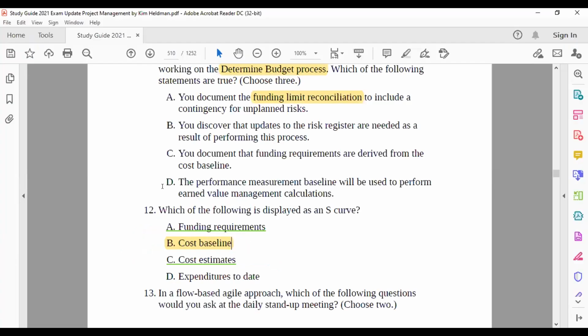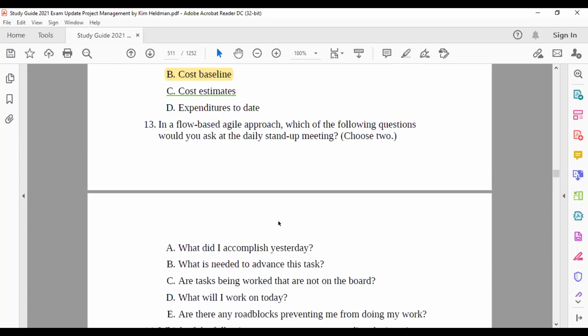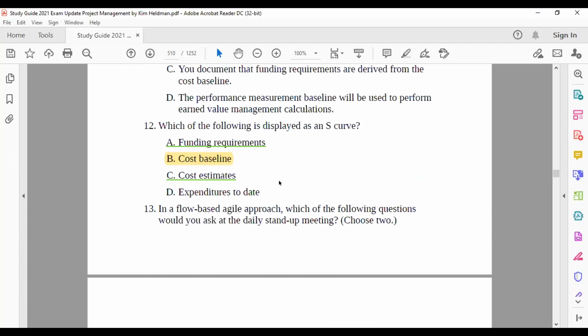In this situation, behind schedule, under budget, you will perform crashing or fast tracking. You need to bring it back on schedule. Fast track. Where I think it should be fast tracking, sir. Fast tracking means no money involved, right? Oh, okay. We have money. We can use crashing, right? Crashing is better because in fast tracking risk will increase also. Right. Crashing. Look, in one question we can find 4 answers directly. So yes, the answer was cost baseline.